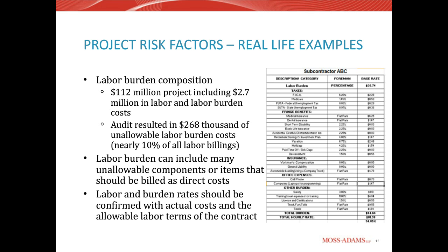And you can use that as a way to negotiate what the rate should be. You can also use that for comparative purposes to see what's the typical burden rate of an electrician or a plumber or a waterproofer.